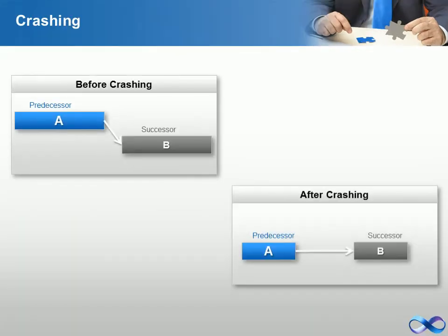Schedule crashing is another schedule compression technique in which you add extra resources on the project activities to reduce the activity completion time. Additional resources are added to the activities to finish it early. It costs you extra money. No significant increase in risks.